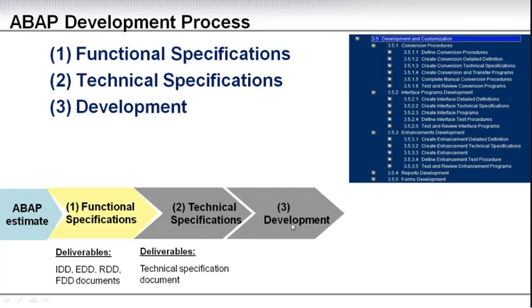You need to agree on, based on your scope. Once you know what items you need to develop, you need to sit down and define the boundaries within which the development will happen: naming standards, variables, structure, certain things common across all the development, common ways that I want you to specify the different program routines. So once you sit down before you start developing, and now that you know the scope, you need to establish that common framework for your development.